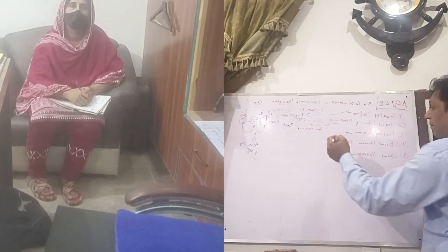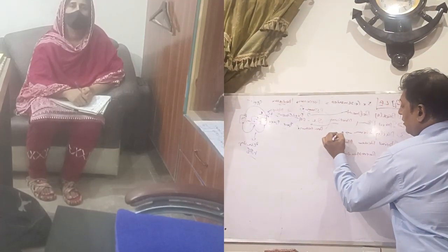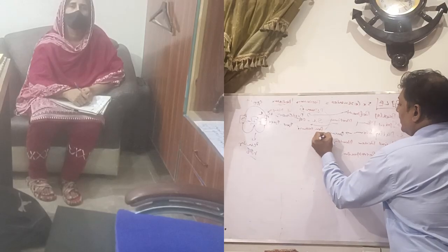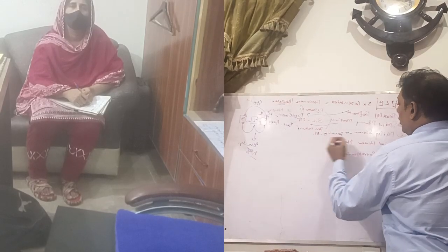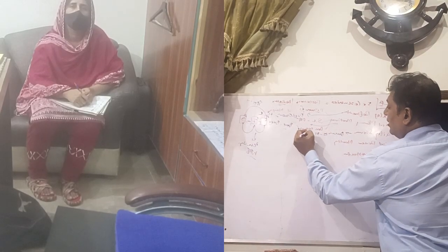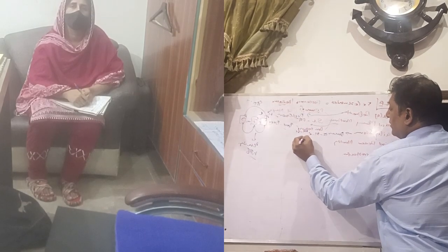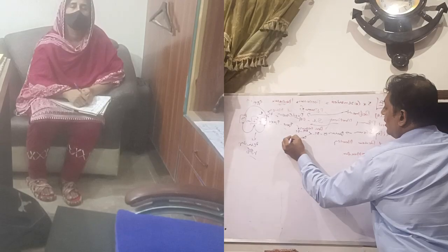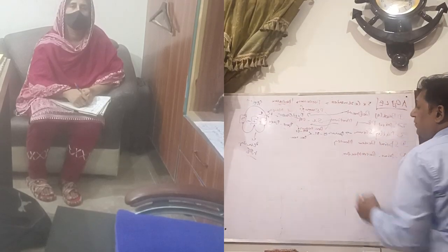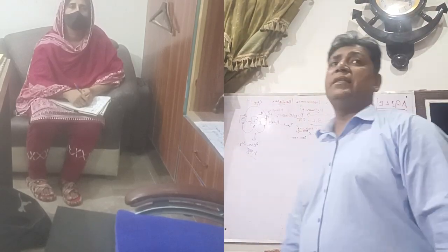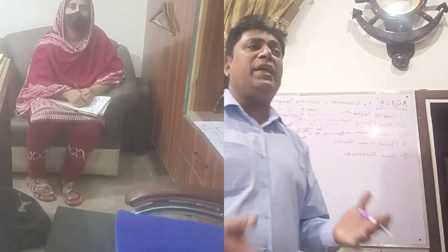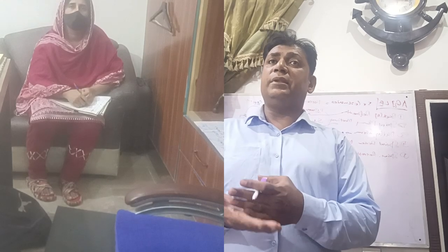All right, daily scrum, duration 15 minutes. Who attends the meeting? You've got the project manager or servant leader, and you've got the development team. It's not necessary for the project owner to attend a daily scrum meeting. Daily scrum is basically a 15-minute stand-up meeting between the project manager and development teams.